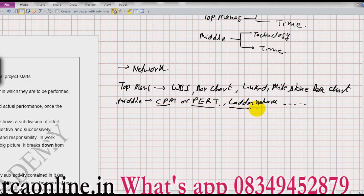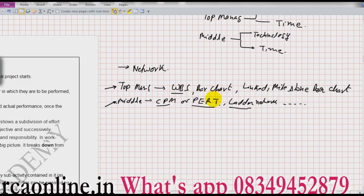For most of the time we will concentrate on CPM, PERT, and ladder network. Day-to-day activities are monitored by the middle management, and some broader monitoring — like weekly, monthly, or quarterly — is done by top management. They deal with the project as a whole, while middle management handles day-to-day activities. So the charts and networks will be different. I will first discuss WBS, bar chart, linked chart, and milestone chart and their limitations, which are not good for middle management, who therefore use CPM and PERT.